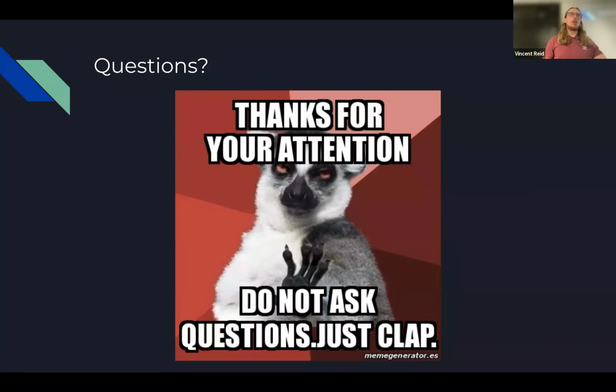So I think what's quite important is you should look at your permutations and then do some high level math based on your experience, based on how long it would take to do different test cases, the aptitude of your QAs and all the relevant parts, and come up with the numbers essentially. So it is a combination of considering how many permutations you have, and ultimately the skill set of the team, the velocities and all that good stuff. So when it comes to me verifying, if I have 10 permutations without kind of actions or stuff, you can basically say, worst case scenario, 15 minutes per permutation or whatever the case is.